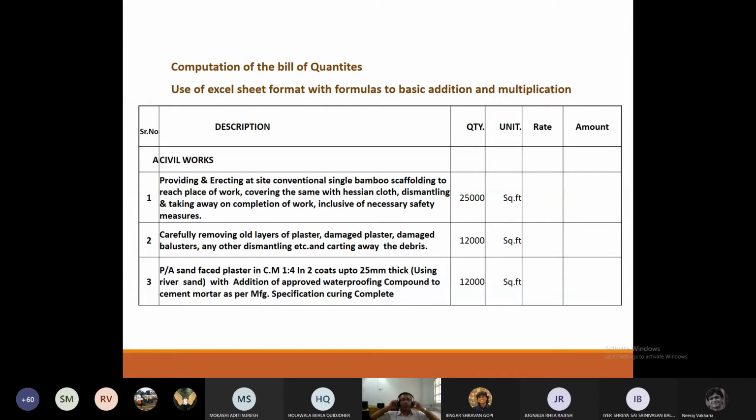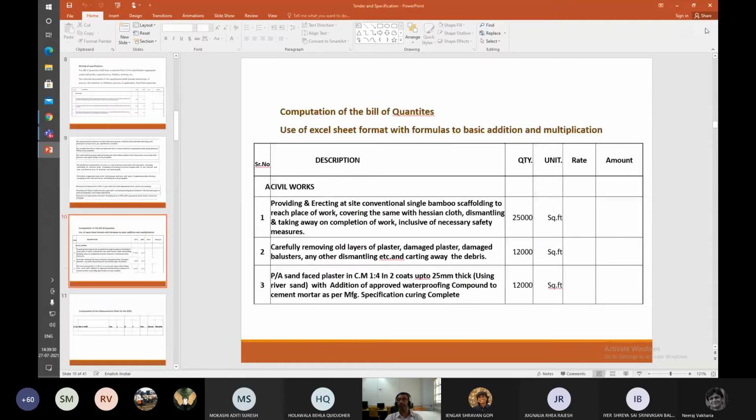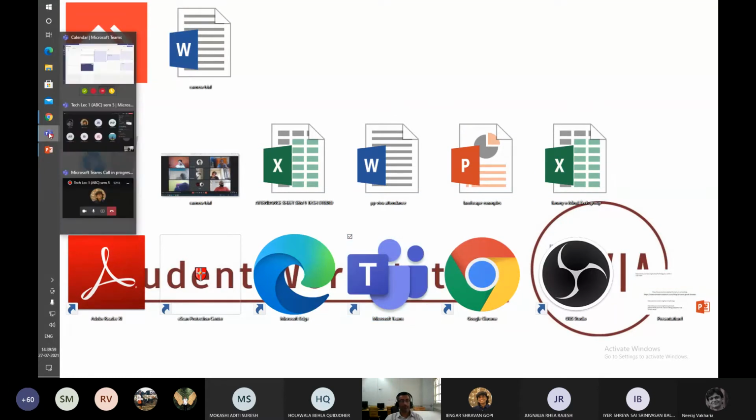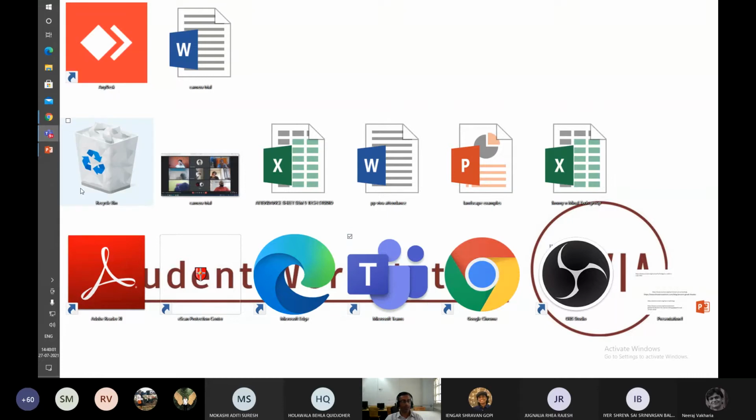I'm taking the opportunity, and I hope everybody is writing. Suppose let us start off our bill of quantity, and if we are to start work, what would you first go about doing? Can anybody tell me? Can anybody tell me, if we had to do barricading? We will first measure the perimeter of the barricading, or the length of it.